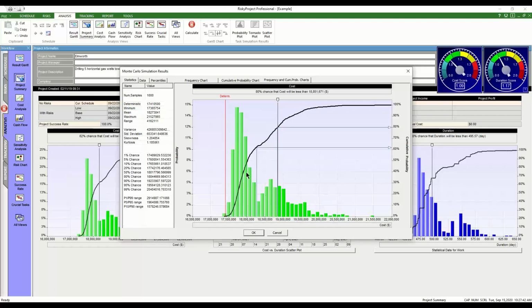And what's this telling us? This is really typical where we have risks in the system that are major drivers in our project. So right here, this represents to me that there's a big risk event occurring that's driving this little distribution here, and quite possibly there's another one here that's pushed this out, because typically you might see it go like this, but there might be one that's overlapping that.